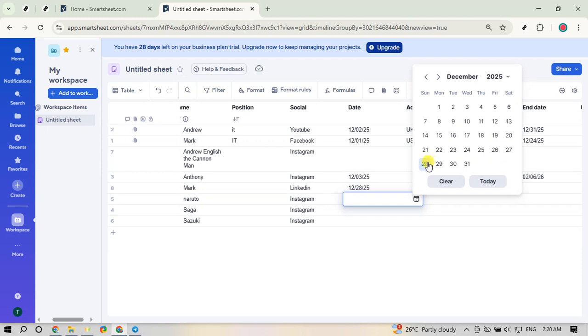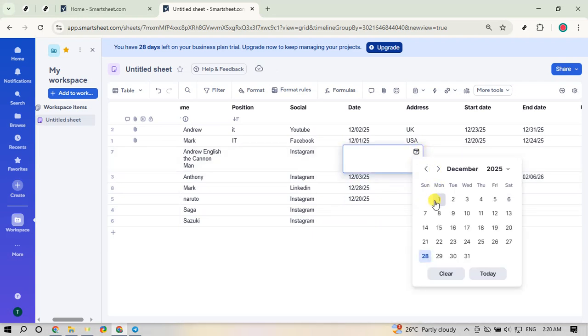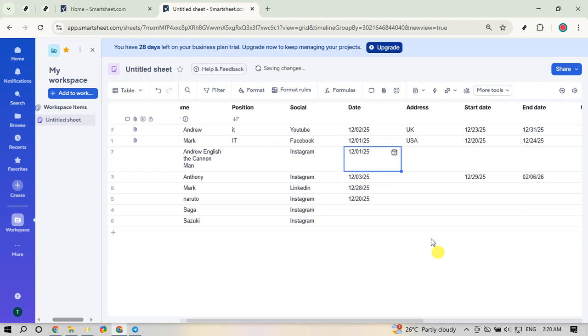A couple of tips as you go: adding a whole number to a date in Smartsheet moves it forward by that many calendar days. If you need business days only, consider using the WORKDAY function with a day count and optional holiday list. To keep your original dates intact, place your formulas in a separate date type column so you always have both the source date and the calculated date. And if you want every new row to calculate automatically, convert the formula to a column formula so it applies consistently. That's all there is to it.